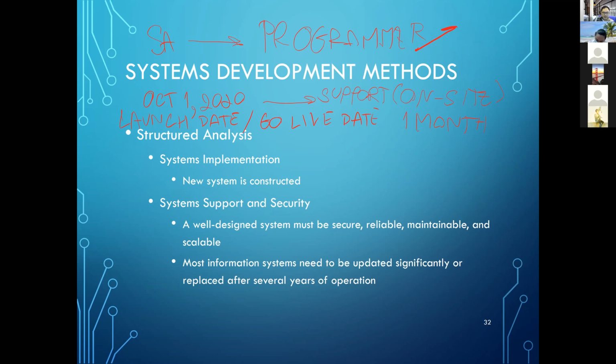And bear in mind that if it is an information system that is used as their operation system, like a sales information system, and it's broken, the system is down or having some bugs, and they can't collect the money or they can't sell the products, for sure they want the problem fixed immediately. Then you need to allocate or assign someone to work as the support team for this system full time, at least 1 month.